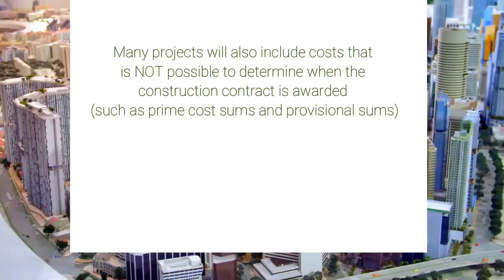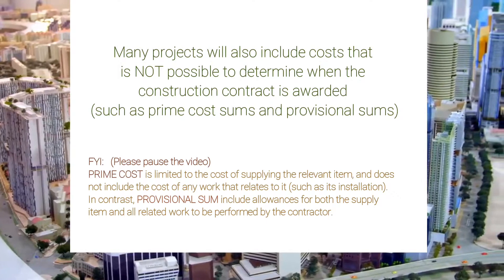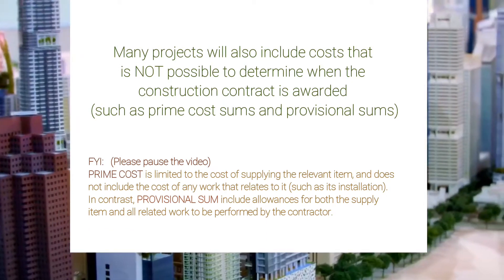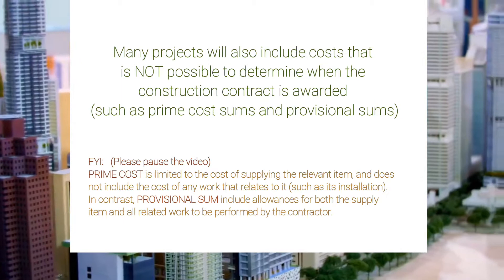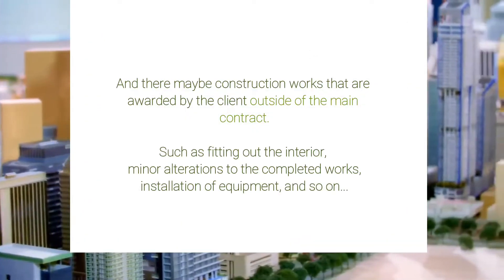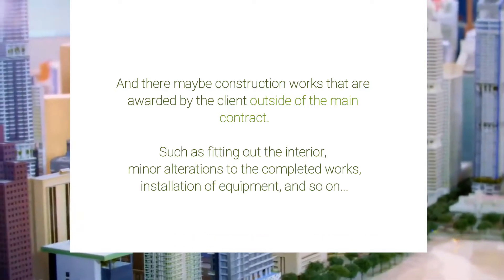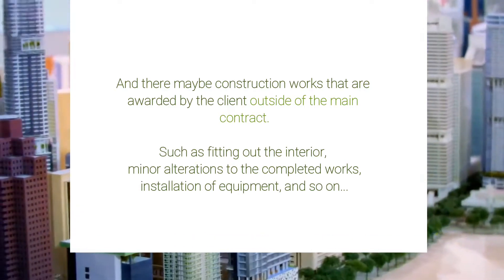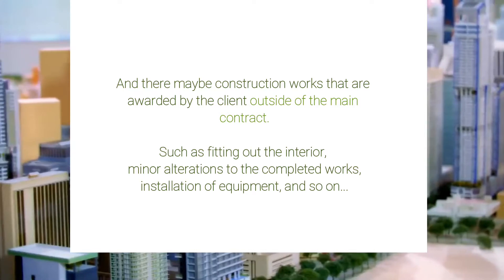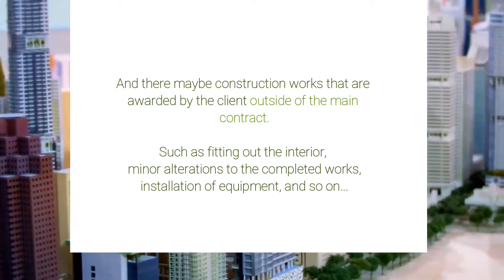Many projects will also include costs that are not possible to determine when the construction contract is awarded, such as prime cost sums and provisional sums. There may also be construction works awarded by the client outside of the main contract, such as fitting out the interior, minor alterations to the completed works, installation of equipment, and so on.